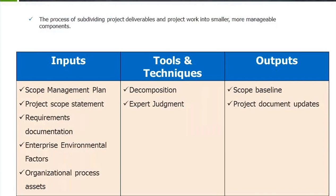The next step is to create the WBS — the work breakdown structure. The WBS provides the details of the complete project requirements and is broken down or decomposed to the lowest level, which is a work package. The inputs are the scope management plan, project scope, requirements document, and EEF and OPS. The tools and techniques are decomposition and expert judgment. The outputs are the scope baseline and project document updates.